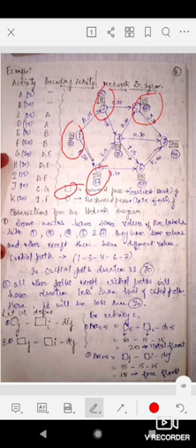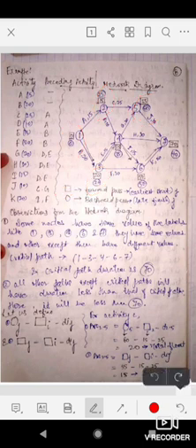Similarly, take one more example. See here, we have 20 inside the square. We can start activities E and F only after 20, because from 0 to 20 we were busy doing activity B. So the square represents the earliest start time of the activity, and the circle tells us the late finish time of the activity. What does it mean?